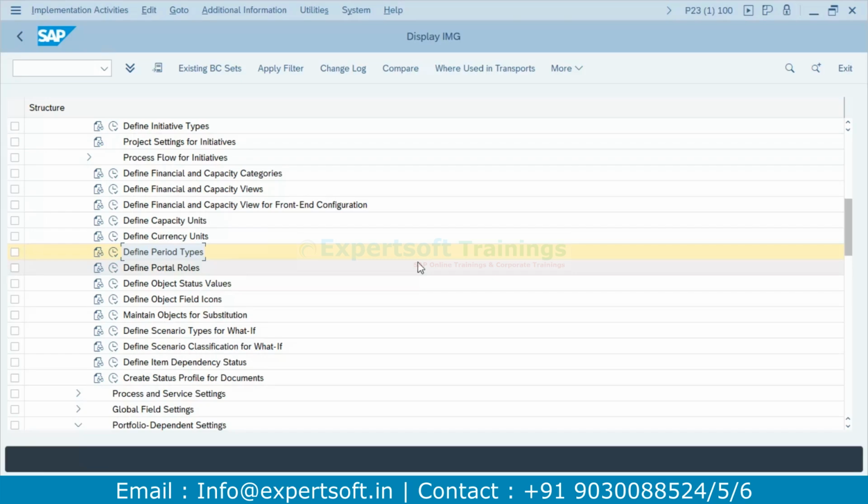Why? Because on an annual basis you do the budgeting at your bucket level. They're not going to do it monthly-wise, only on a yearly basis. These are the top level buckets. For the below level buckets, if you want, you can cascade from that and make changes on a monthly, quarterly, or half yearly basis. If you do not want, you can keep it yearly only. The system by default will give you a yearly basis because the parent is yearly only.